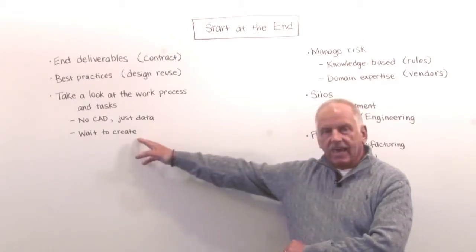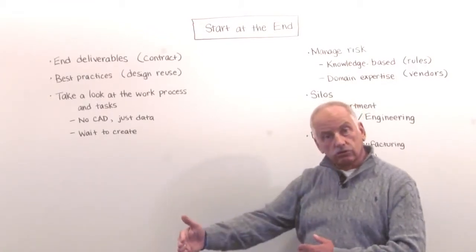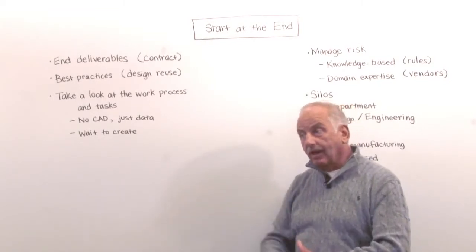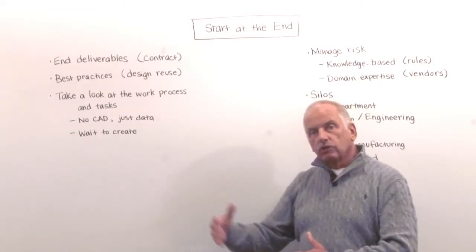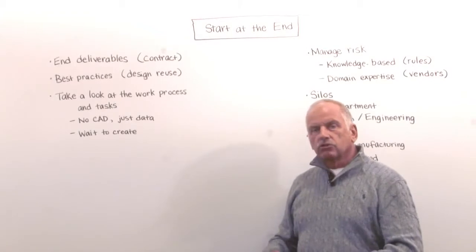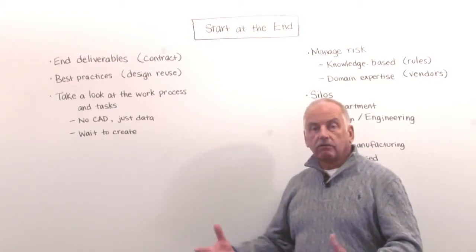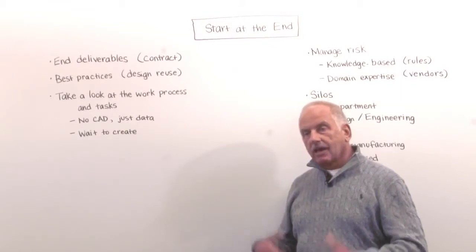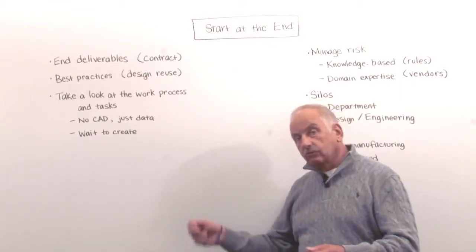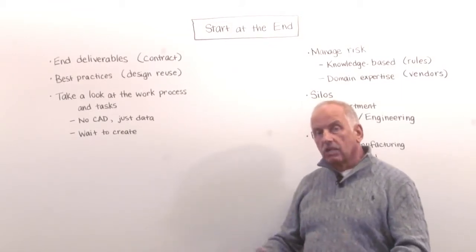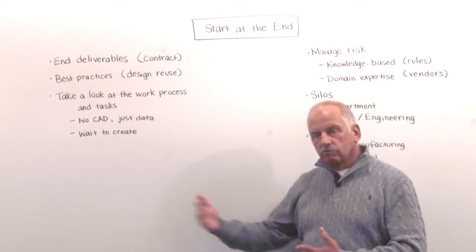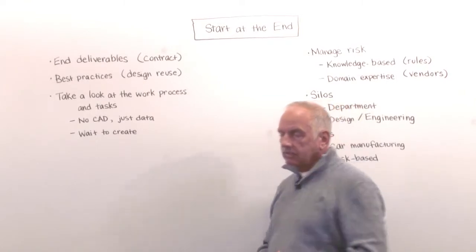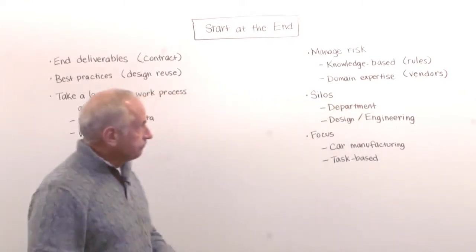Just wait if you can, unless you have a certain milestone, of course, when you have to create deliverables in order to get maybe some payments from the client. But wait before you create the deliverables, because the deliverables are more or less like a report out of the system, and you don't have to do it like in the past, where you had to create it either by hand in the old days or by a CAD system. Just create the data and wait with producing the deliverables. I think that is also something that maybe you can consider and would help.